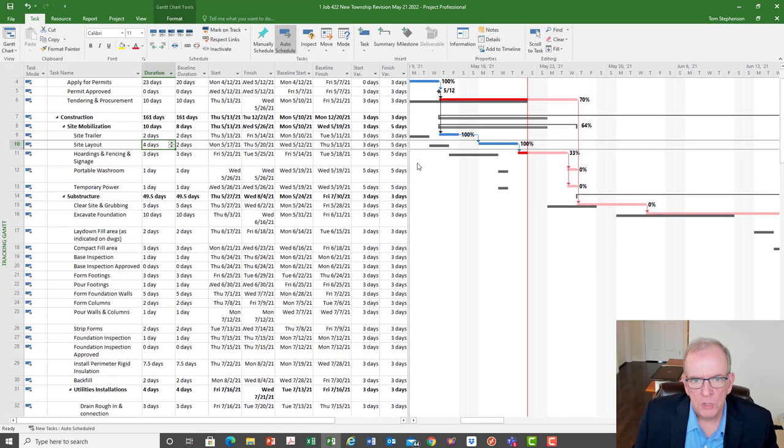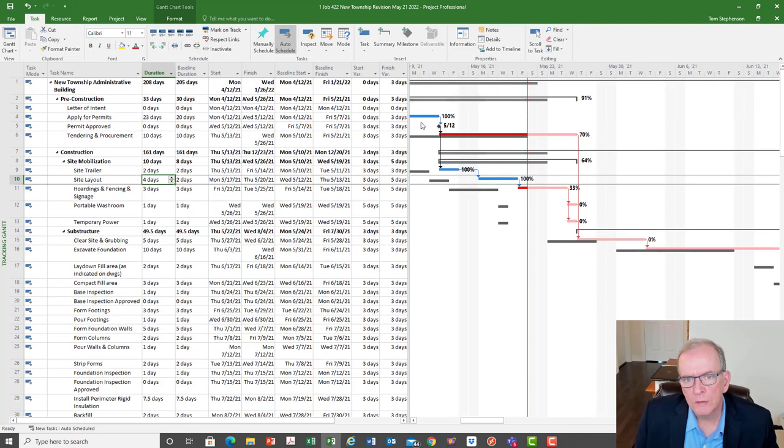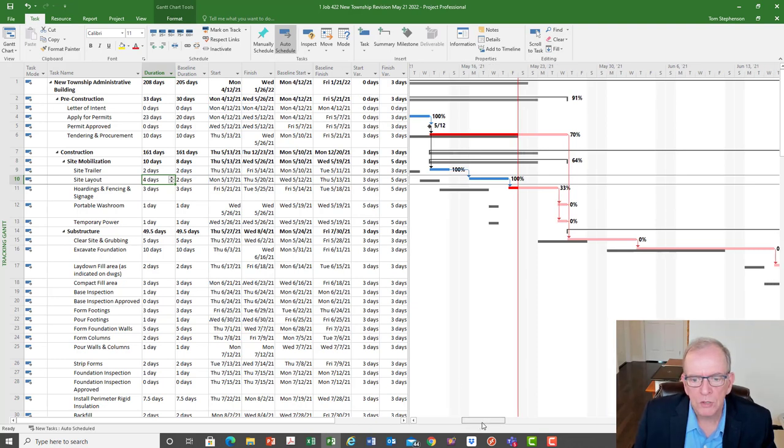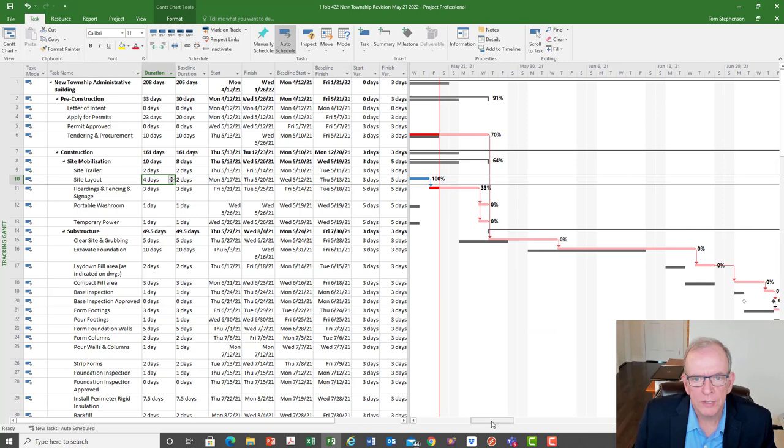All right, so we know we're 5 days behind. And if we did a really good update, I went into the detail on this in the previous video, we would have left notes as to why the permits were delayed, why this took 2 days longer. Really good to document things. But right now, we're just trying to figure out how do we get the time back. So we're actually looking forward on our schedule.